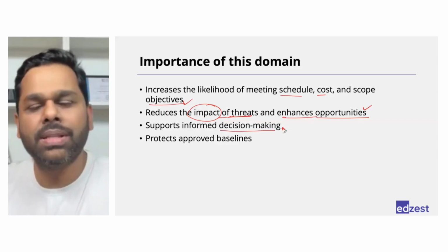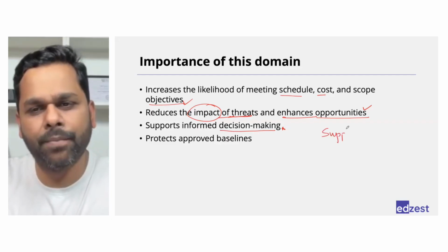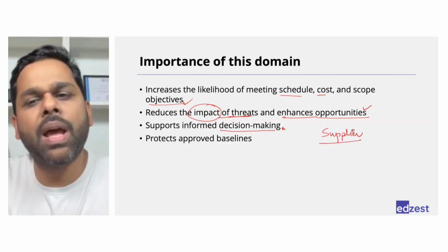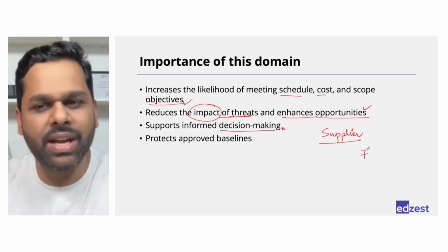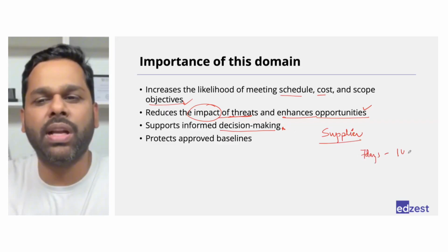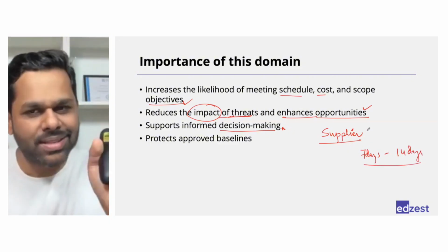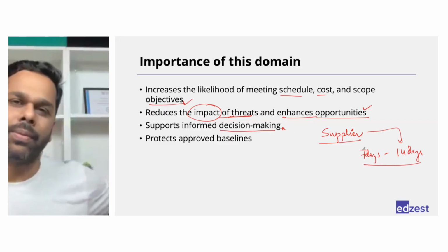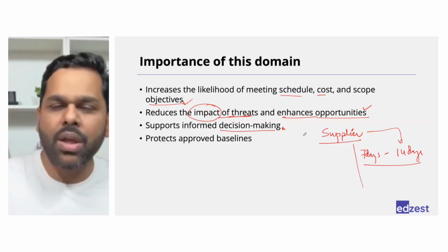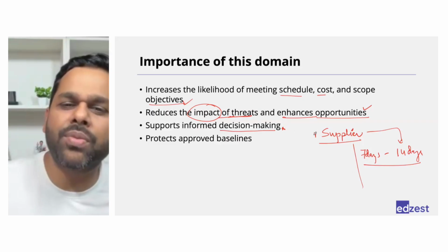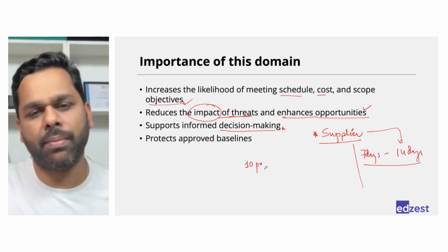See, many a times what happens is that when you are working with a supplier, we know that the supplier would delay the material. So if our calculation says 7 days, while committing, we say 14 days. There's no guarantee that the supplier would deliver in 14 days also. Instead of this, what we can do is check how many times we have worked with these suppliers. Somebody would say last 10 projects we have worked with them.